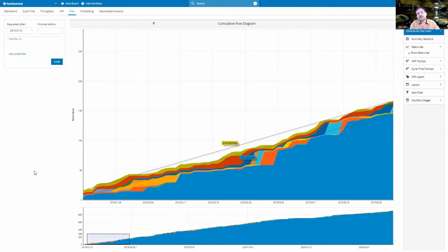Another phenomenon we often see are bulging bands, like in this case. Here for this, it is testing before deployment. So it might be viable that we kept it till the total end. But often it will show us that we actually have a bottleneck, especially if the bulge keeps on growing. And if we have got something like a vanishing band, that might mean there is starvation. And often they are in relation to each other.